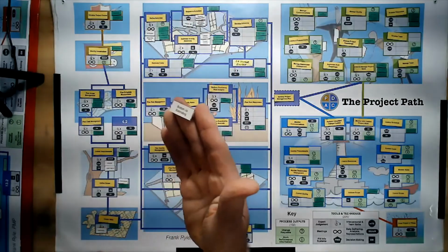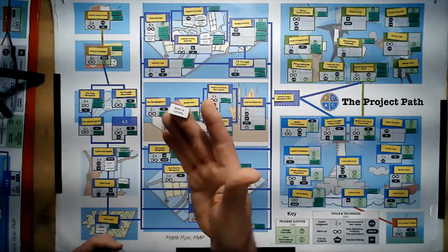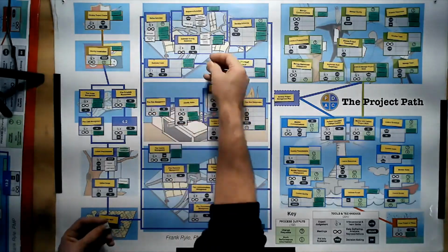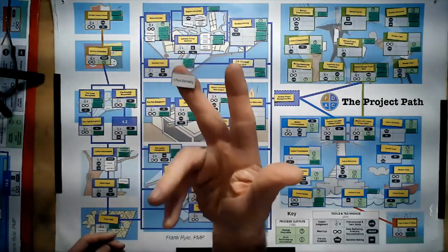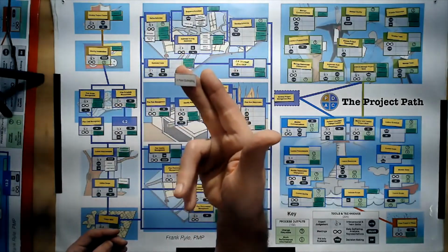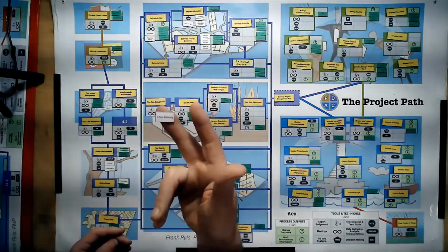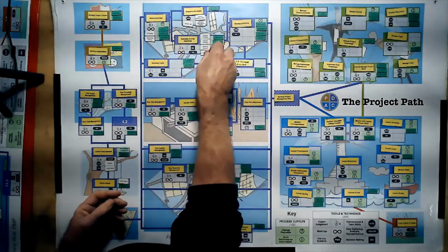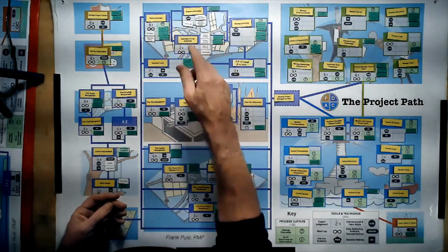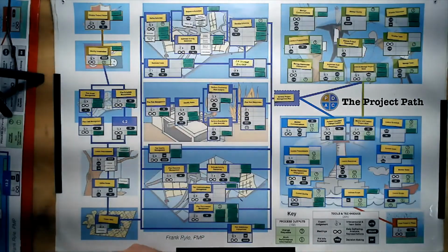We do have the bottom-up estimating, which is going to the bottom of the work breakdown structure, going down and adding up. Okay, so that would be the bottom-up estimating. And then we have 3-point estimating, whether it's PERT, the beta curve, or whether it's triangular with a triangle. That is a 3-point estimating. We're looking at 3 points, the optimistic, the pessimistic, and the most likely, and we're doing some calculations. So there you go. They're the estimating types that we might use, and so therefore they would be techniques.